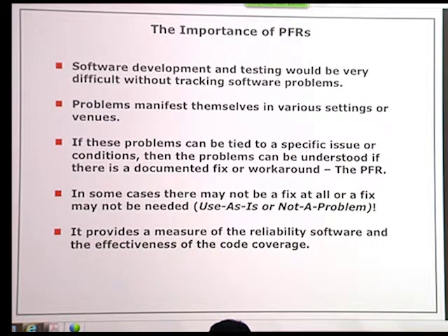And sometimes when you finally get down to the bottom of things, you might find that there may not need to be a fix. Either you can live with the issue, you understand the problem, and there's a workaround, so you can deem it a use-as-is issue, or it may not even be a problem at all. There might be an issue where someone was not following the correct procedure and ran into a situation, and it might not even be a problem. Or the software might be behaving as expected, according to the requirements, but it was driven into a situation it wasn't supposed to work in.